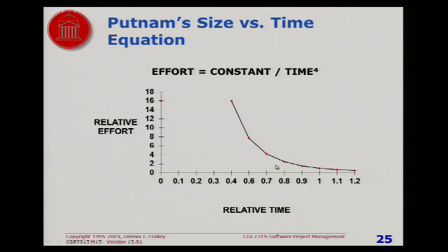The other big difference, and there's an important message here. According to this equation, and the formula for this equation is right here, if you allow more time, it'll take less effort. And if you followed this equation, you'd say, give me enough time and I can get it done for 0 effort, or close, arbitrarily small effort. Obviously, that's not true.